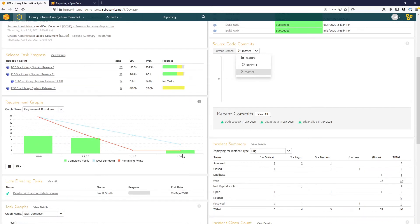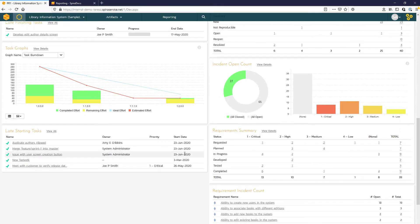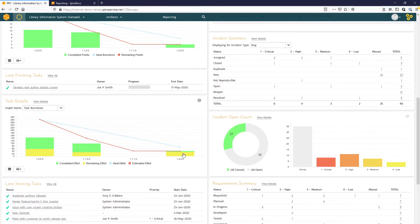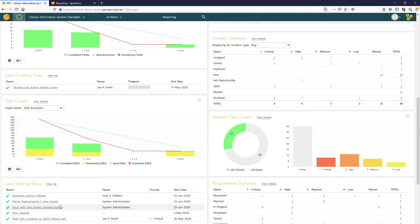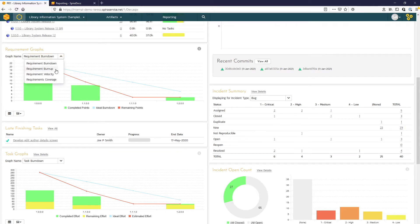Also available on this dev view are widgets that highlight the task progress. So we have late finishing tasks, late starting tasks highlighted here, and then we have some graphs that give you the burn down velocity or burn up views for requirements and tasks.